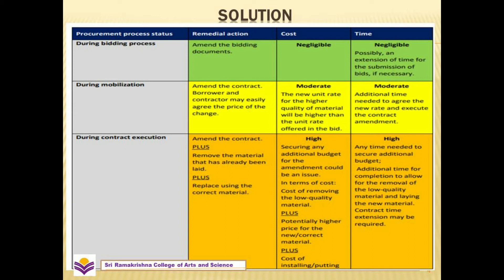The third stage of the procurement process: if we found any defect during the contract execution period, we would need to amend the contract, remove the material that has already been laid, and replace it using the correct material. Obviously, the cost and time would be higher. Securing any additional budget for the amendment would be an issue, as would the cost of removing low quality material and adding new quality product.